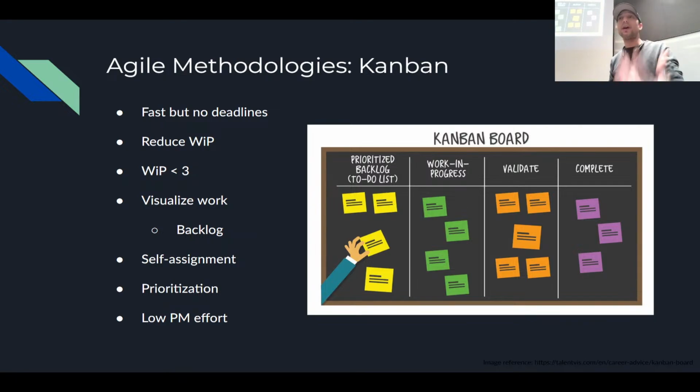However, if you are going to have engineers pull on tasks, this means you must have your tasks prioritized in order, okay? So you need someone to prioritize the backlog. Either a product owner, which is a Scrum term but is kind of bleeding out of Scrum now, or some kind of product manager or stakeholder, someone to make the decision of what is the priority of tasks. Now, this is great if you don't have a dedicated PM, which if you don't, oh God, I'm sorry, good luck. But if you don't have one, Kanban's a good option because the process is just making sure stuff is up here, checking your WIP and making it small, and then just moving stuff along as you go, okay? You don't need any special meetings, except for maybe your backlog prioritization, and engineers can operate mostly autonomously.